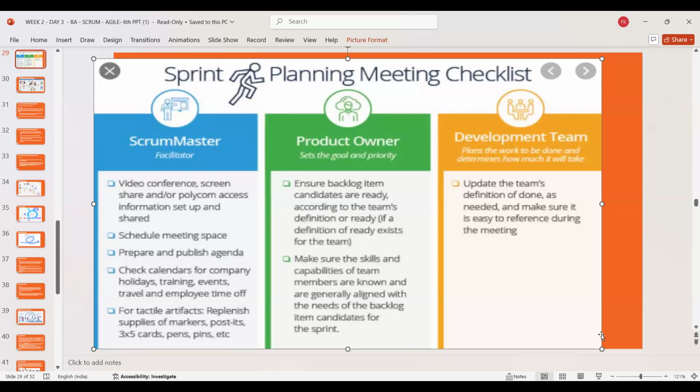So in this sprint planning meeting, we have to ensure that our development team members and all the stakeholders are on the same page. They have an agreement on which items they need to start working on. Now you may ask, what is the definition of ready, or what does that mean? That means in this current sprint, if we are planning to work on any particular requirement, any prior requirement to that, are they complete?